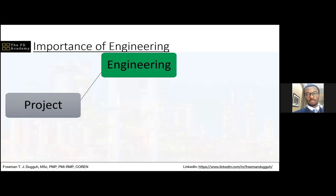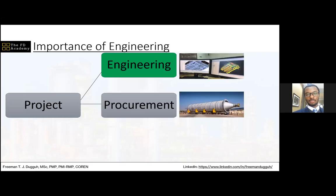That's a brief summary of the things you expect to achieve in the engineering phase of a project in the oil and gas industry. Then comes the procurement phase. In the procurement phase is where the procurement professionals purchase the equipment, such as mechanical equipment, pressure vessels, heat exchangers, and so on. They purchase equipment and materials. When you talk about materials, you're referring to things like pipes and cables and so on. These procurements are based on the